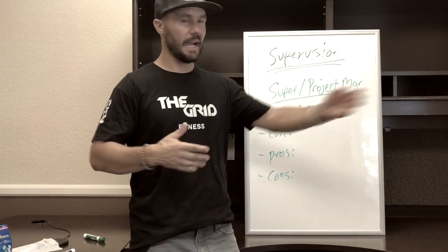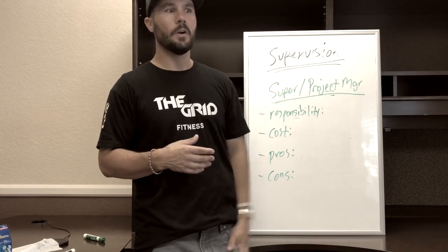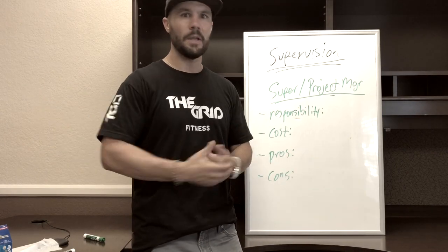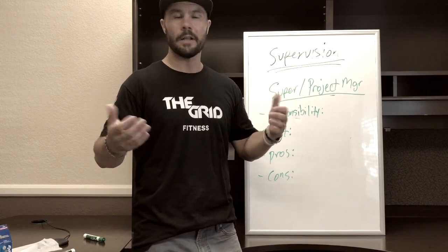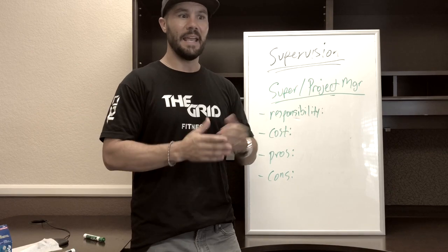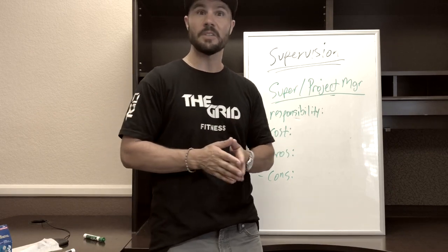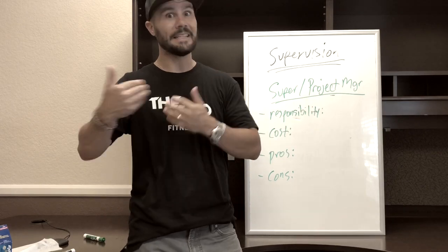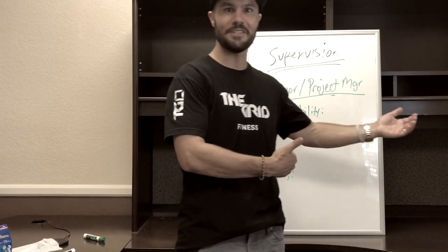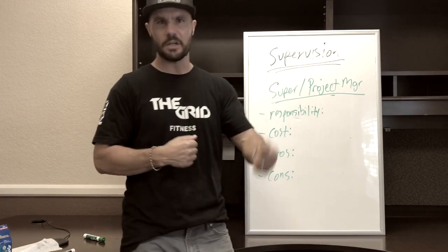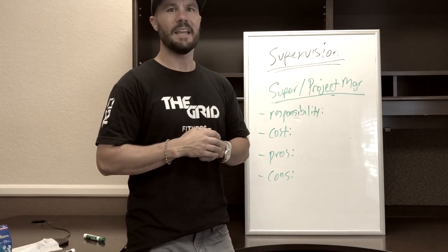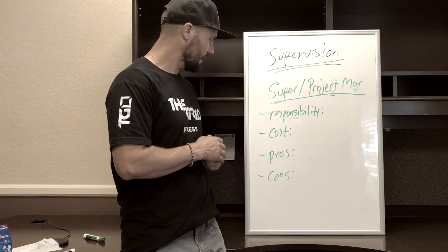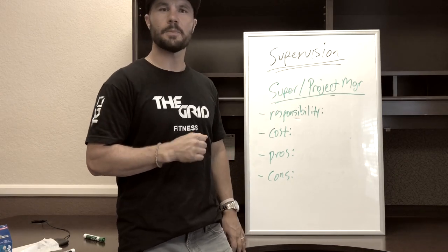Because sure enough, my tile guy is going to be tied up on a big job, or he's going to flake out at some point, and I've got no one to call and I'm scrambling. It also keeps all my subs honest, because they know there are other subs bidding for my work on this project, just like the last project. So it keeps them hungry, keeps them working for my business and wanting to do a good job. Okay, so that's a supervisor, project manager.